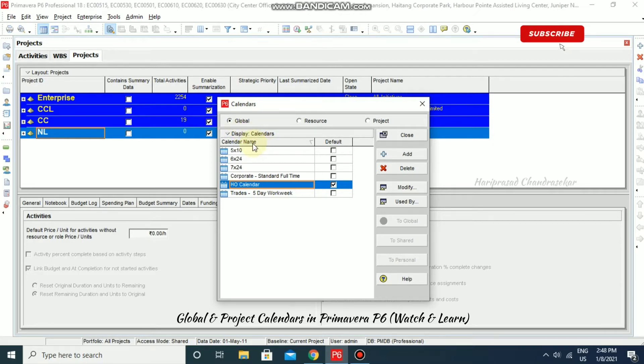If you link Resource and Project Calendars to a Global Calendar, then any changes you make to the Global Calendar will automatically be applied to all linked Resource and Project Calendars as well.